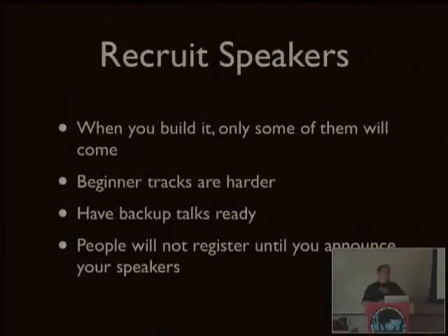A good strategy there is you will have some people that will submit 3 or 4 talks to your event. And what you can do is say, we'd really like you to give this talk, but could you also have this other one that you submitted ready just in case we need it? And there you have a speaker that's already coming to your event and is committed and is also prepared with an extra talk just in case you need it.